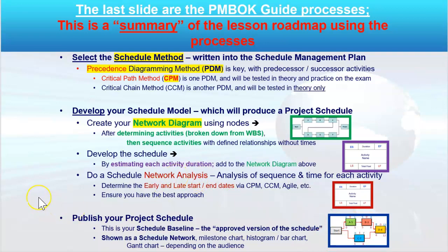After that, and we're satisfied, we've looked at other courses of action for doing our schedule, bam, we will publish our schedule. And when it's called the approved version of the schedule, that becomes our baseline.